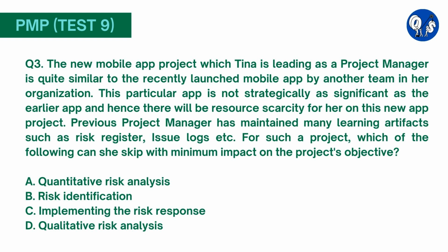Quantitative risk analysis in project management is the process of converting the impact of risk on the project into numerical terms. This numerical information is frequently used to determine the cost and time contingencies of the project. In order to conduct a quantitative risk analysis, you will need high quality data, a well-developed project model, and a prioritized list of project risks.